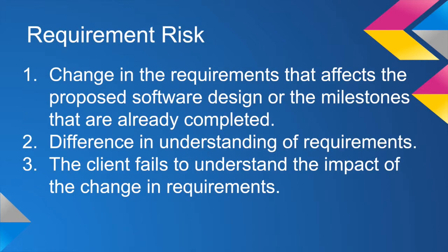Next, we cover requirement risks. This identifies the risk of not managing expectations and requirements properly. Some of the requirement risks for this project include change in requirements of the proposed software design, difference in understanding of requirements between client and development team or within the development team, client failing to understand the impact of the requirements, hence resulting in delay in the project.